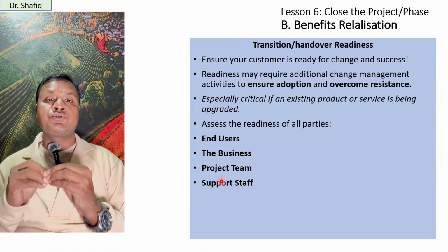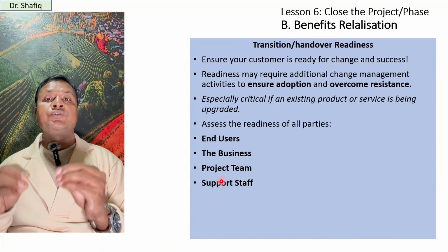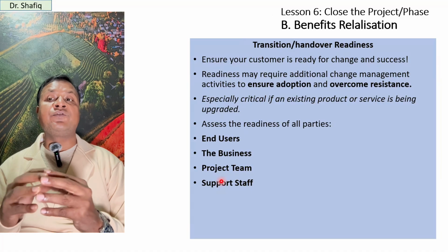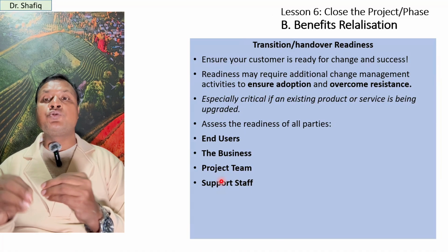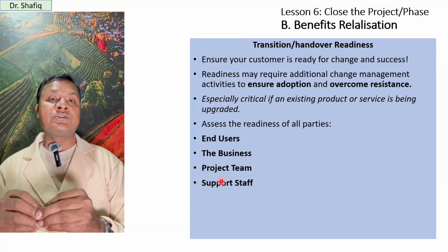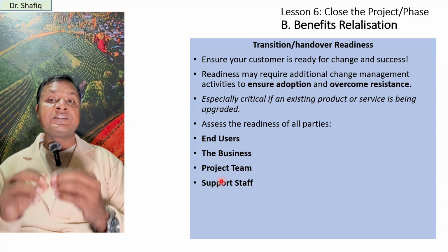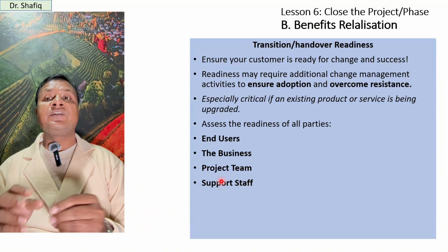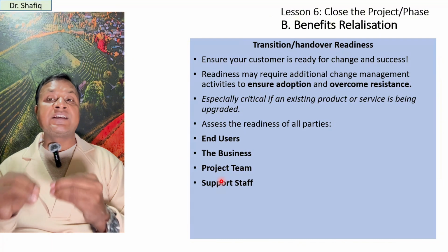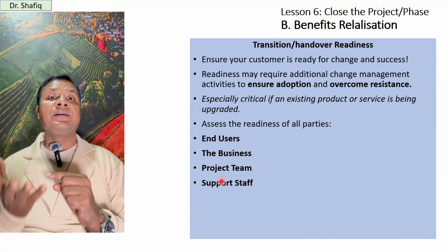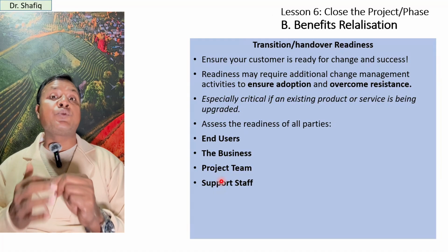So first we should check the readiness of transition or handover. We should ensure the customer is ready for change and success. Checking the readiness may require additional change management activities to ensure adoption or overcome resistance, especially in critical situations if an existing product or service is being upgraded. So we should assess the readiness of all parties: end users, the business, the project team, and the support staff.